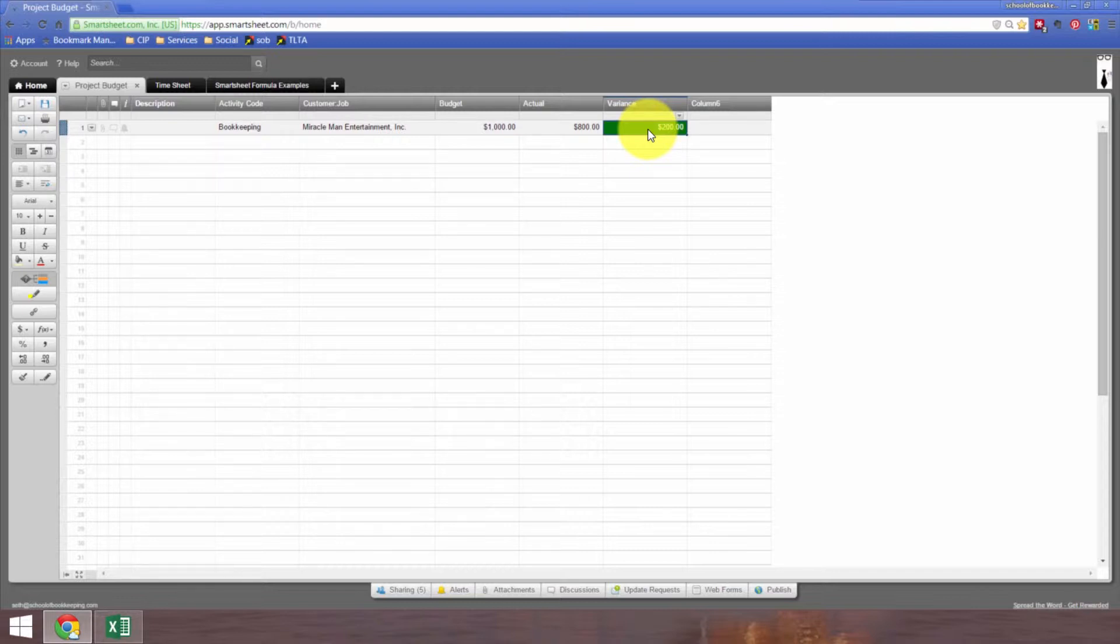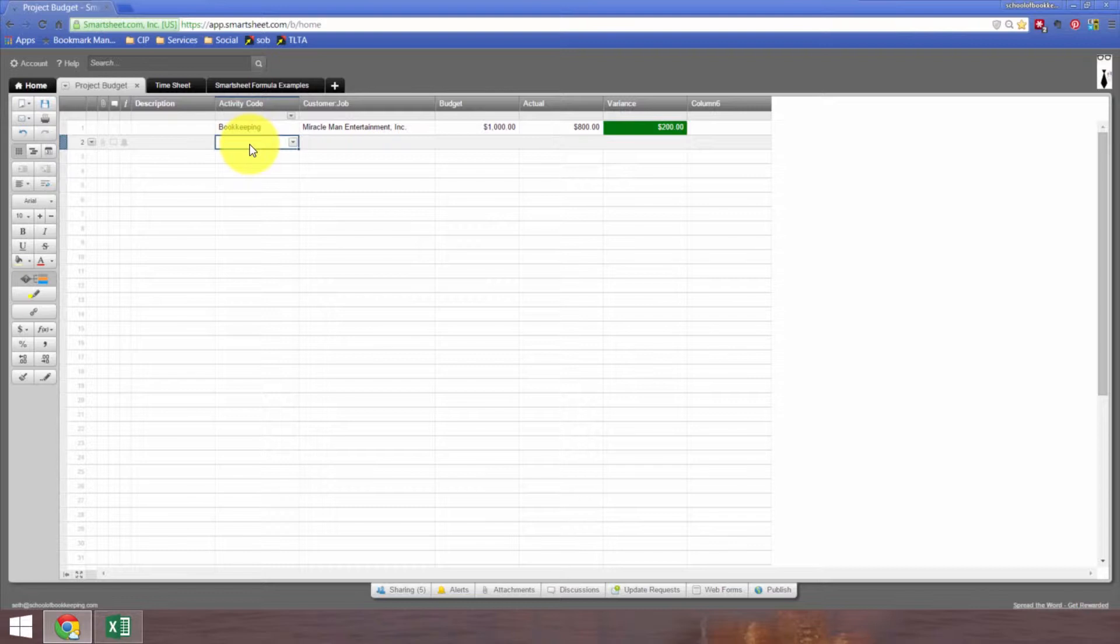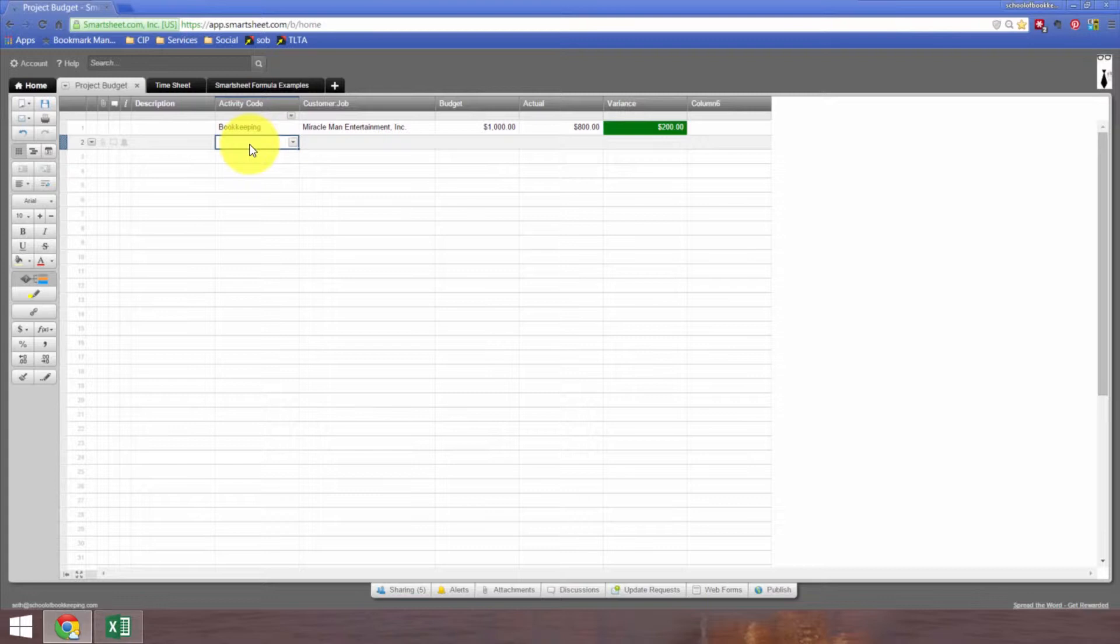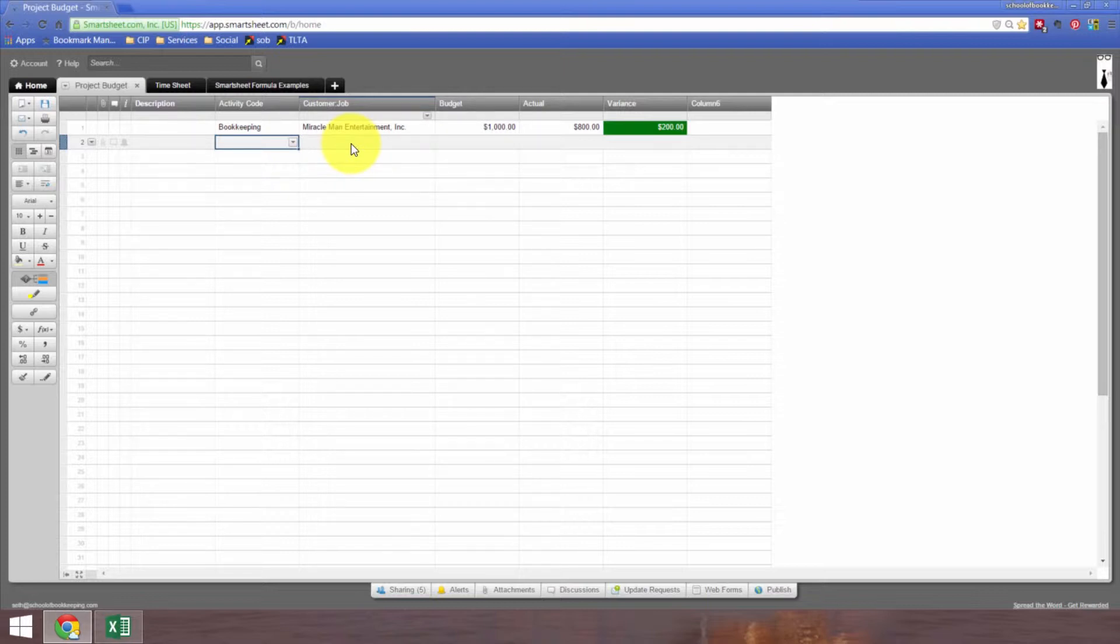This is a very easy way to set up a budget. All you'd have to do is add in all your line items. What items need to be performed to complete this project? We've already looked at detailed task lists for accounting and tax engagements. You could add this into a project like that, where you add the budget columns and activity code. For each thing, you could identify how much we expected it to cost and how much it actually costs. Then you can do the revenue side too.